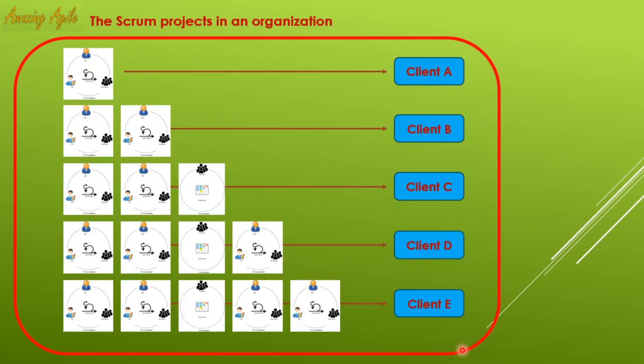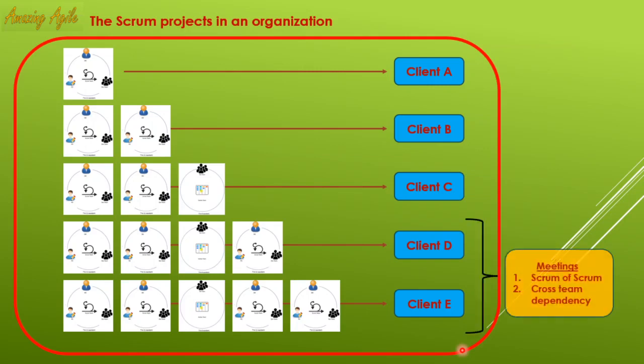For client D and client E, you have to conduct a Scrum of Scrum meeting and a cross-team technical meeting for dependency management. These two additional meetings are not mentioned in regular Scrum, but when you run multiple projects on the Scrum platform, you must hold them. Scrum of Scrum means all scrum masters from different projects meet at one point in time to discuss project status, dependencies, and roadblocks, and try to find solutions. Similarly, a cross-project dependency meeting must be established.